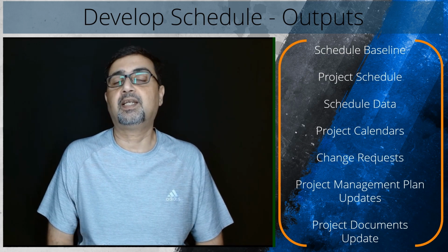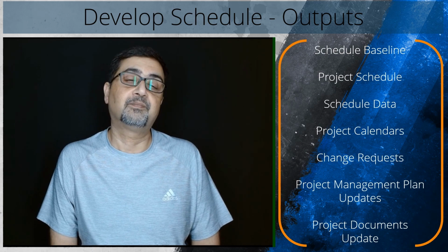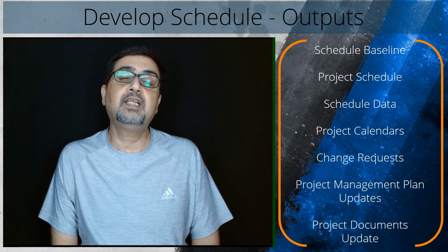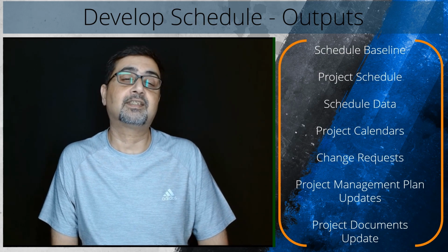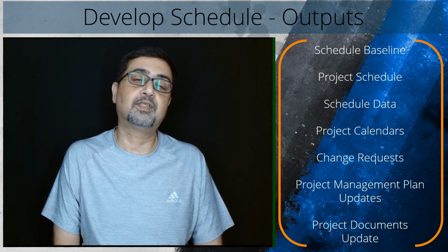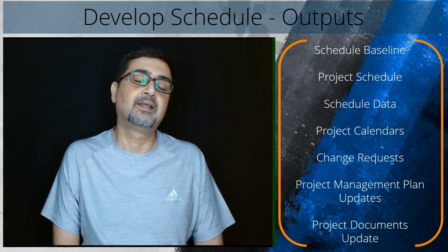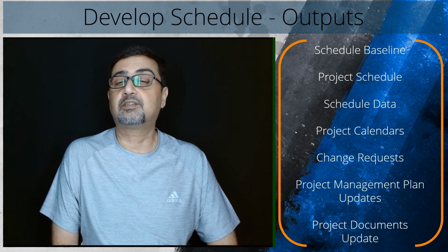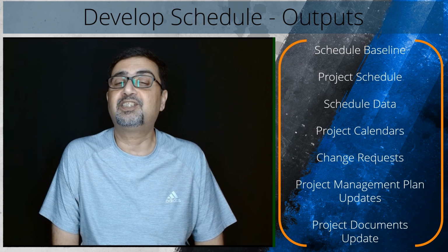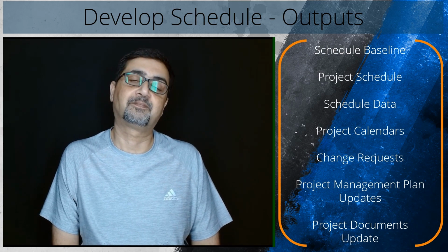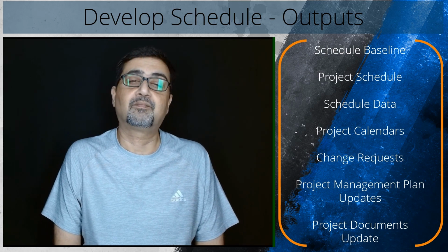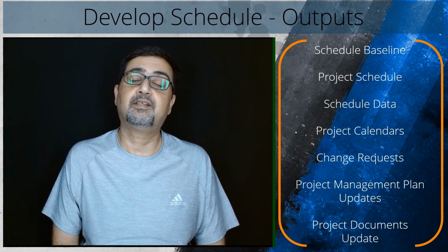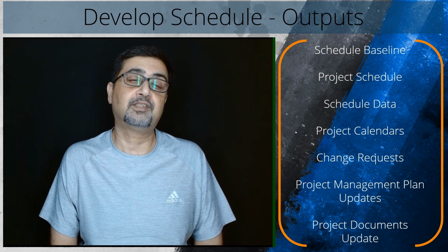If resource planning is done at an early stage, the project schedule remains preliminary until resource assignments have been confirmed and scheduled start and finish dates have been established. This process usually occurs no later than the completion of the project management plan. A target project schedule model may also be developed with a defined target start and target finish for each activity.